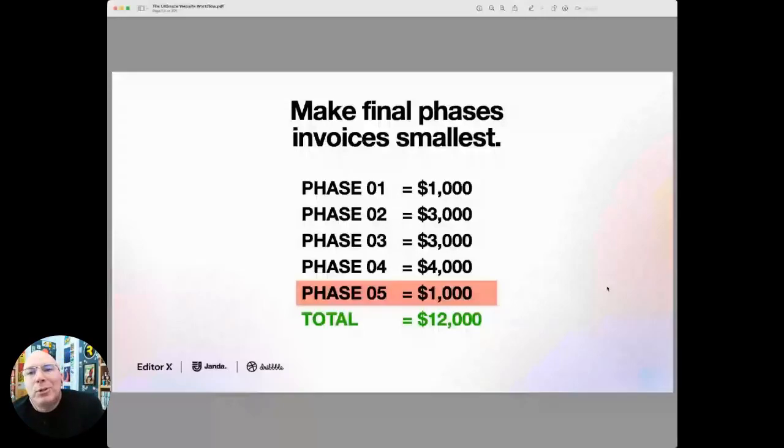Has this ever happened to you? You have a client who won't approve the final. They're holding out, and you're stuck waiting to invoice them half the project. Has that ever happened to you? So if so, put that in the chat, and lots of yeses coming in there. So do it based on phases, and you eliminate that problem in the future.